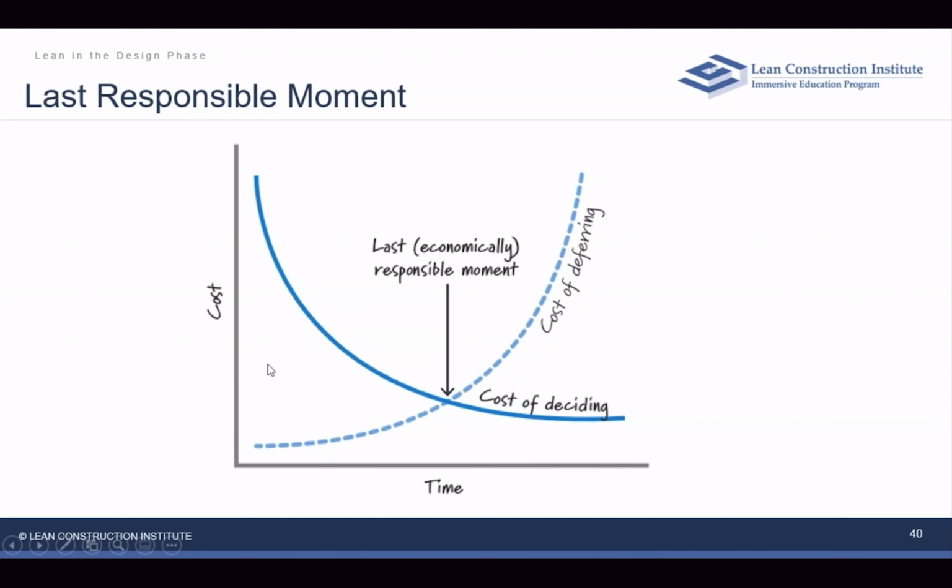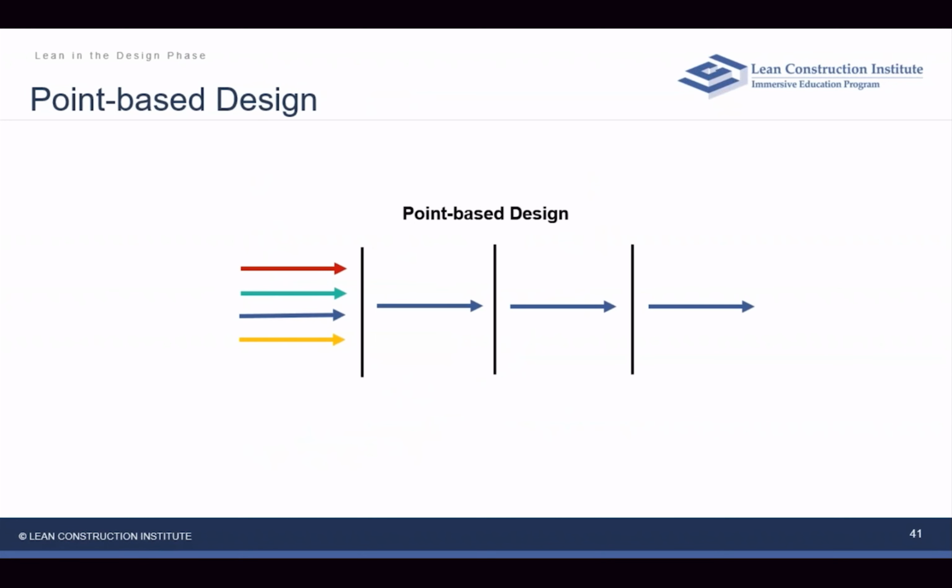So how do we find that sweet spot? Often engineers and designers are trying to figure out where that last spot is that we can make that decision. And contractors are often thinking, well, how early do I have to make that decision so that I don't have negative impacts on the backside? So this is something we always have to be thinking about. And the goal is that we're not making decisions too early in that time cycle. So this is what leads us into the idea of set-based design.